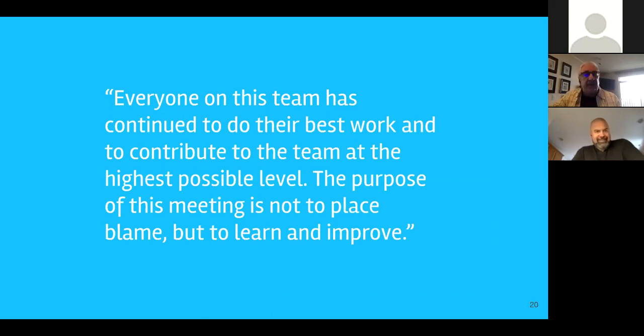So this is kind of different from traditional postmortems and learning sessions and things. Also because it's meant to be on the small scale. It's thinking about 2 weeks worth, and it's meant to be sort of ongoing within the team. So we're thinking about what can we do in the next 2 weeks to do a little bit better, or the next 2 weeks after that. And we do it on an incremental basis, not trying to think, well, how could we have done the last 9-month project better? And coming up with a long list of things that we'll never implement to make it work.